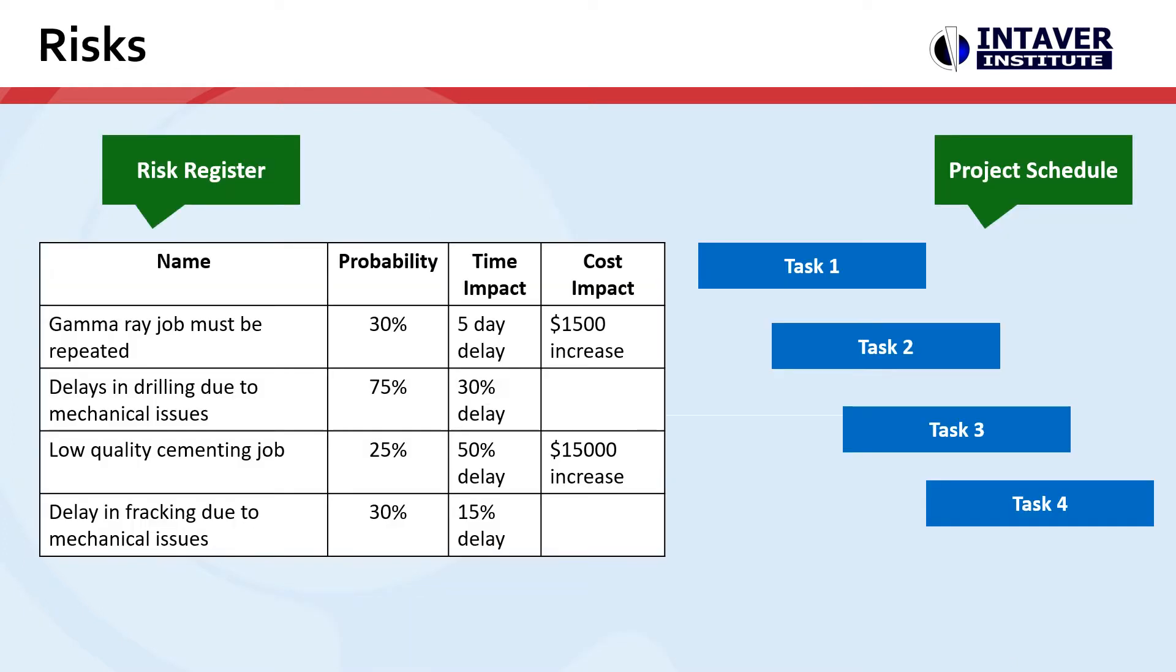Next, we need a list of risks. The risks should have a name, probability, and impacts, and we're going to assign these risks to activities in the schedule.